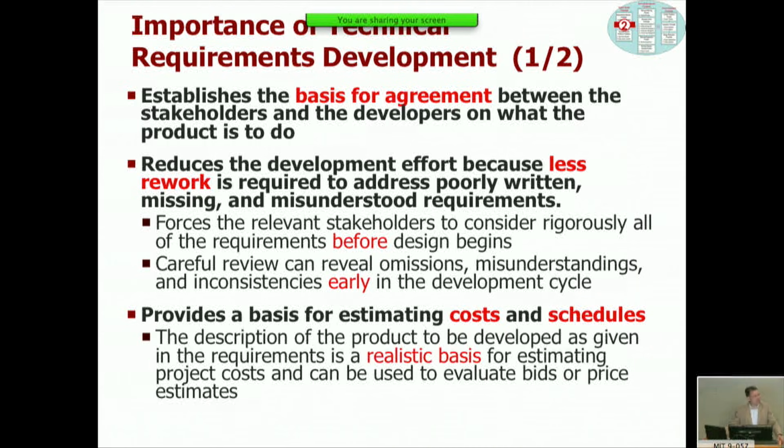A requirement set is also a basis for cost and schedule estimates. And so some of these missions that overran, do you remember I showed you this chart last time? We analyzed 40 missions, Earth and space science missions. Like 20% of them were responsible for 80% of the overruns. A lot of that had to do with unrealistic goals or expectations and requirements.